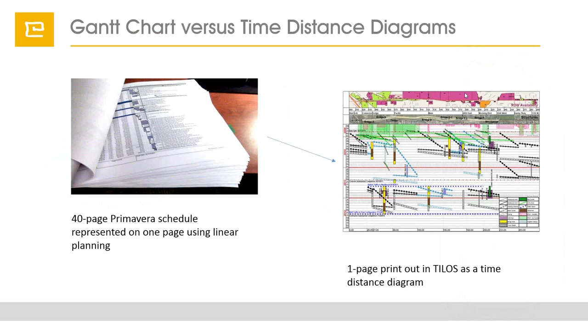Those which are acquired are in green, the others in red, and we then have activities, those rectangles, to see which areas are blocked for work because there is no permission to go on this ground. For this we use activities that are shown as rectangles. In the other case we are using linear tasks that show the movements of the crews.